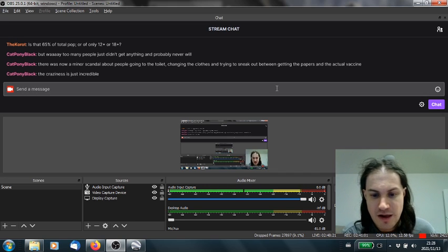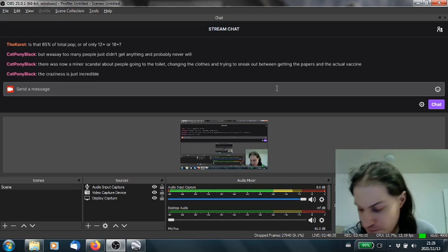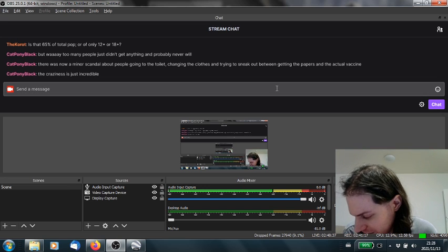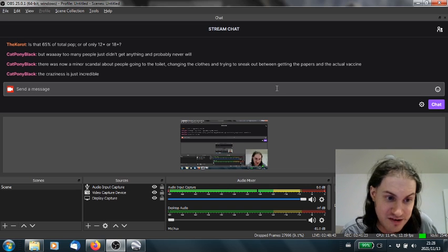So the contractors can see this is a thing that you should expect to bid between 300 and 500 million kronor. And yeah, they can go a little bit outside, but if you're bidding a billion kronor on 300 to 500, it's very unlikely it will be read seriously. If costs are rising to 600, yeah, sure.